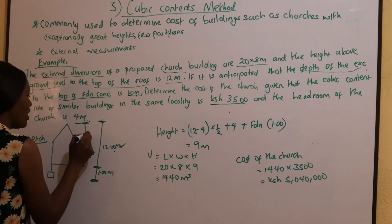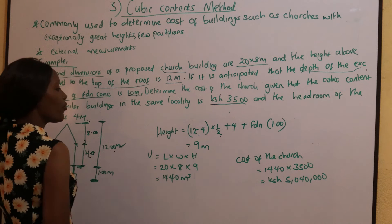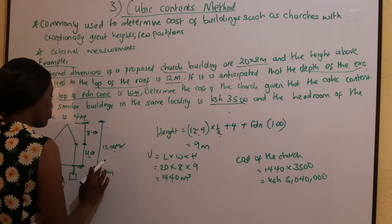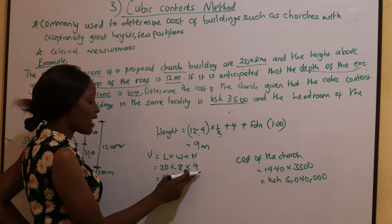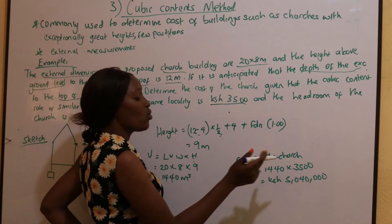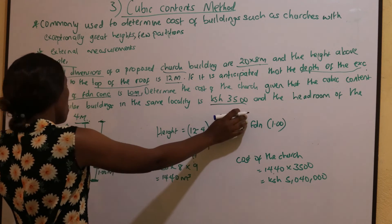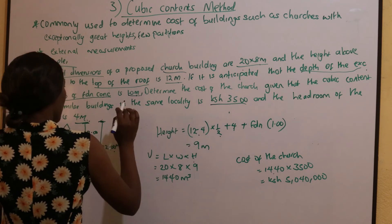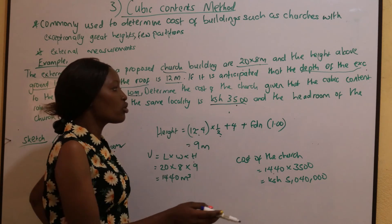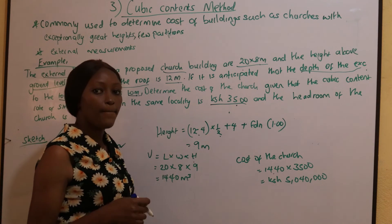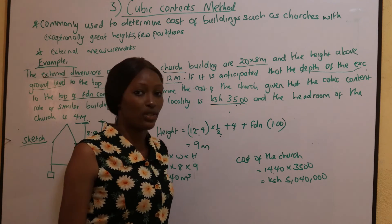So we take the volume as 20 times 8 times 9, which gives us 1,440 cubic meters. The cost of the church will be the total volume, 1,440, multiplied by 3,500 — which was the cubic content rate per cubic meter for similar buildings in the same locality. That gives us 5,040,000 shillings.